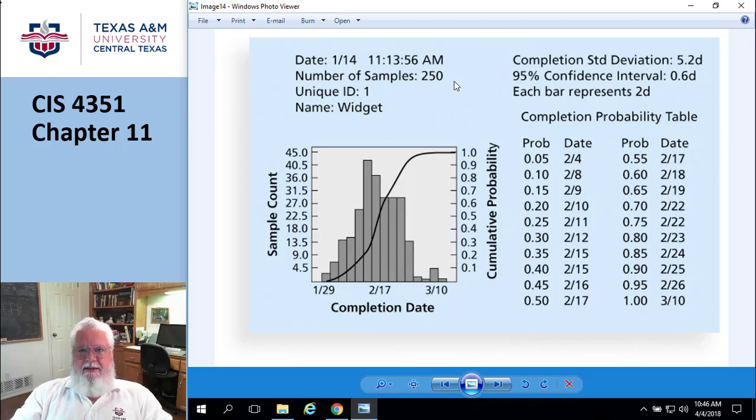Cool. So, on page 451, they talk about this in a little bit more detail. It's called sensitivity analysis. Sensitivity analysis is when you pick one particular element. Monte Carlo, by contrast, uses all of the factors. With sensitivity analysis, I pick one and say, how much of an effect is this going to have on my car payment? If I was just to change the interest rate from 2.5% to 3.5%, you just tweak that number up and go, oh, okay. Well, what happens if I change the period of the loan? Instead of 60 months, it's 48 months or whatever, and you pull that down and go, oh.